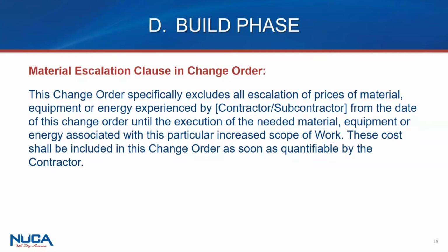We can put into the change order that this change order does not include all my costs, because I don't know what the costs are yet. They may fluctuate when I go back if you're ordering things out of time, or include it would even be better into the change order. But if you can't protect yourself and say, as this term in this slide says, these costs shall be included as soon as quantifiable by the contractor, that in your change order protects you.